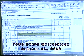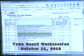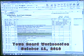or budget next year for just the design work. Maybe you just want to spend money in 2011 for design work. And then once you see the design, then you can say, yeah, okay, let's budget money in 2012 for the construction. But yeah, if it's in the budget, that's how it's been tradition.